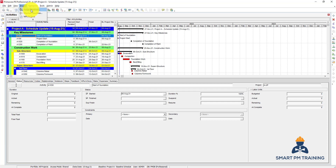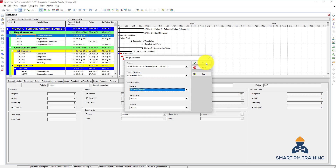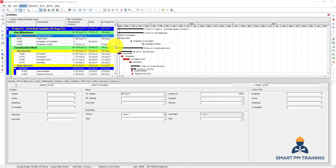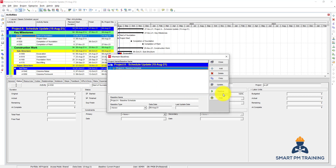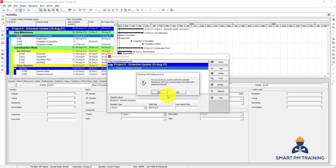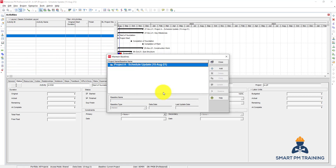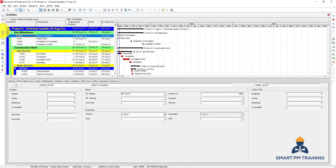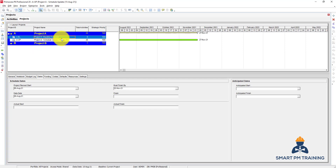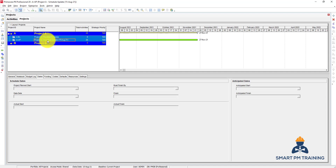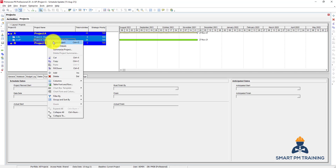Let's remove the assignment of the baseline. From Projects, click OK, then Maintain Baseline, click on the baseline, then Restore. I had to de-assign the baseline first before restoring it. You can also have the option to export two projects at one time in one file, and when you import them back to Primavera you will also see the same two files.